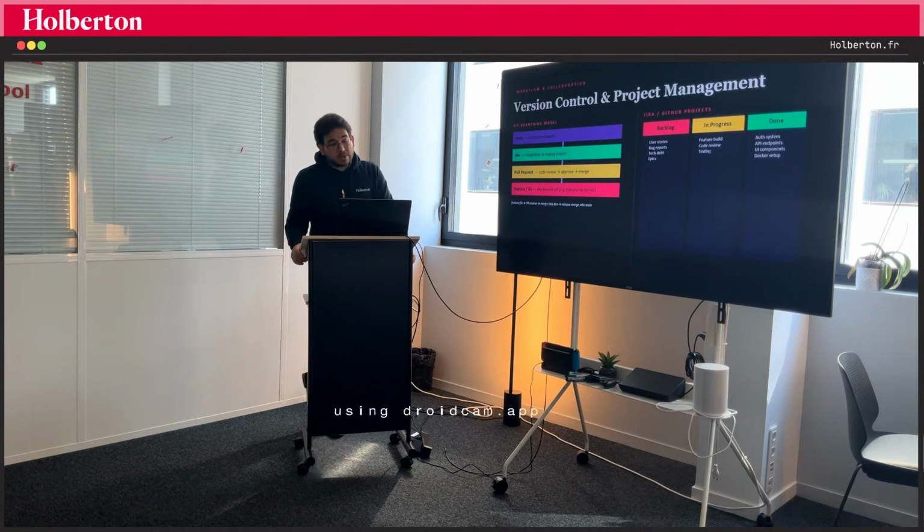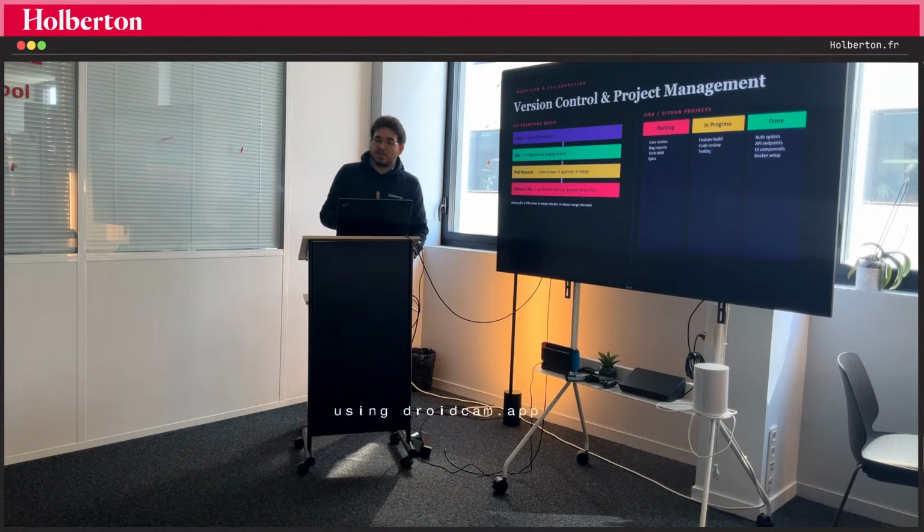For the management of the project, sprints, to-do list and such, I used Jira initially, then I moved on to GitHub Projects. In general, I add to-do list items into the backlog. I choose which one I need to work on, or I plan ahead and follow the plan to mark them in progress, work on it, commit, push, pull request, and then mark as done.